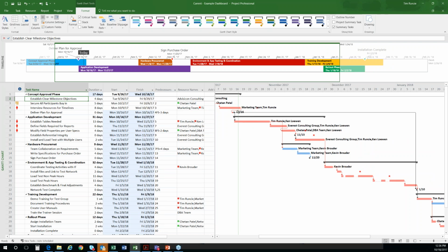So your question was, what about that percent? Well, that percent has nothing to do with work, has nothing to do with percent complete. It simply looks at the predecessor and says, when I want to move the start date left or right for the successor task, what does that look like? So if I put in plus 25 with the percent symbol, it says the finish of task number one takes the entire duration of task number one and gives a 25% buffer, or basically it moves that out.